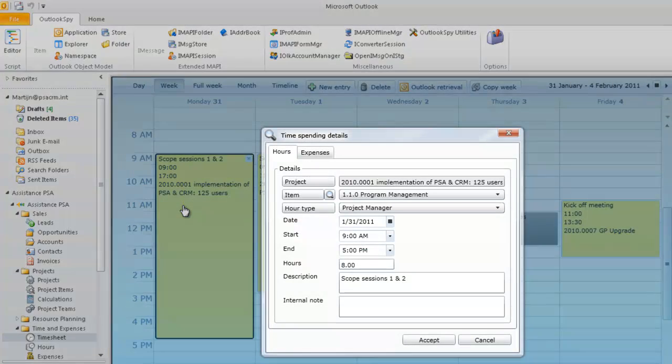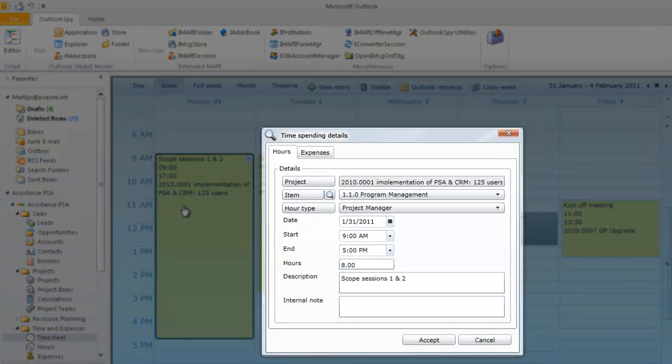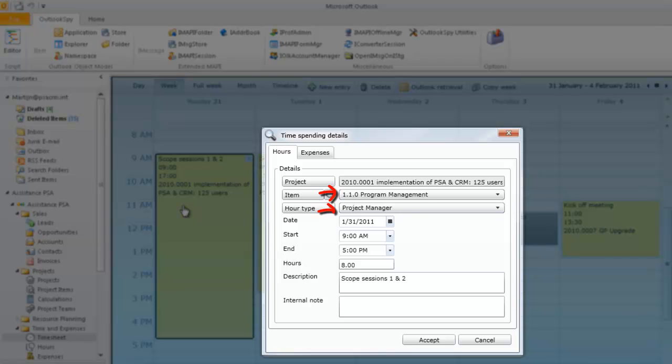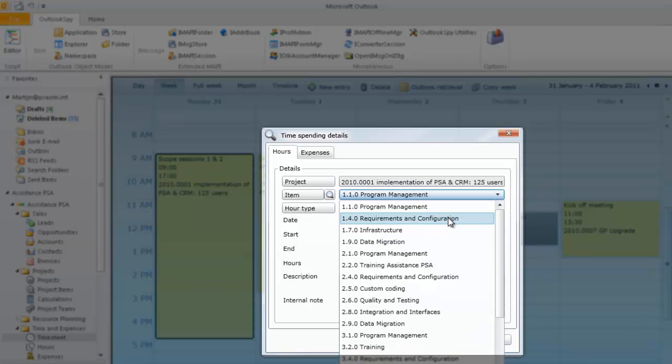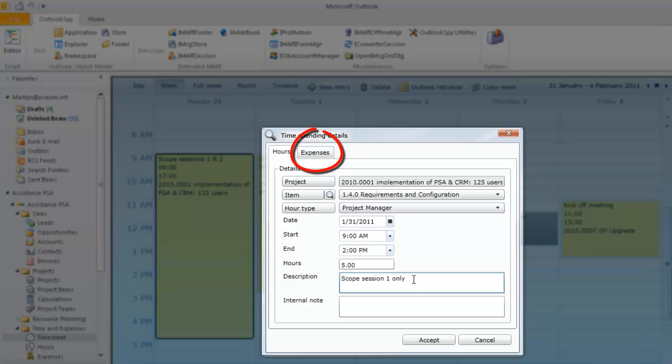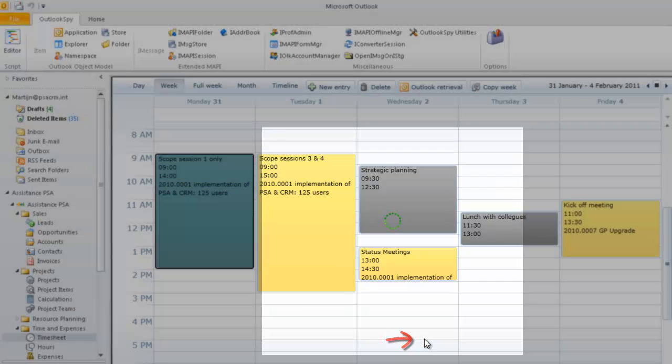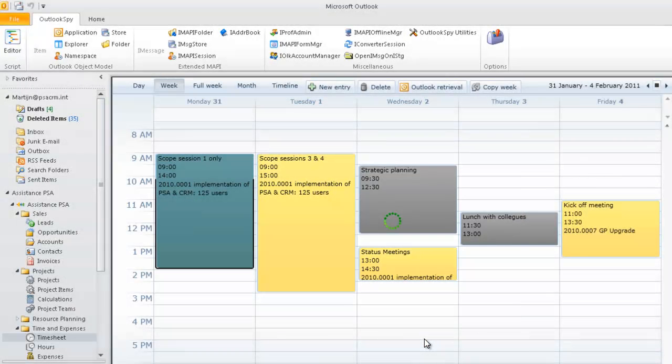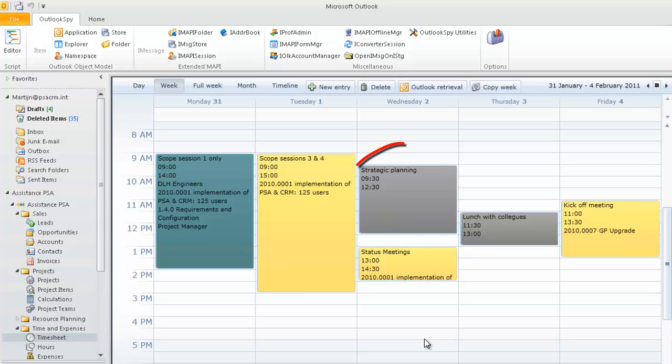Open one. By default, PSA has selected the first active item of the project, as well as the primary hour type of this employee. In both cases, you may change the selection by using the drop-down menu. You can modify the date and the number of hours initially scheduled, as well as the description field of your entry. And you can also book expenses to your project via the Expenses tab. Once you are done, simply click on Accept to save the information.